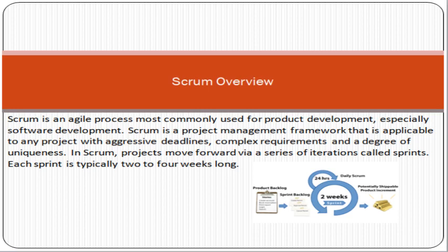So in that way, in the iterative approach, you deliver the tasks in sprints to the customer. You are getting the feedback from the customer and you are delivering to the customer in chunks. In sprint 1 you do the planning, development, testing and then deployment. Then sprint 2 planning, development, testing and then deployment. Sprint 3 same, sprint 4 same, till you reach sprint 4 and complete the whole project. So this is the main concept of the Scrum.